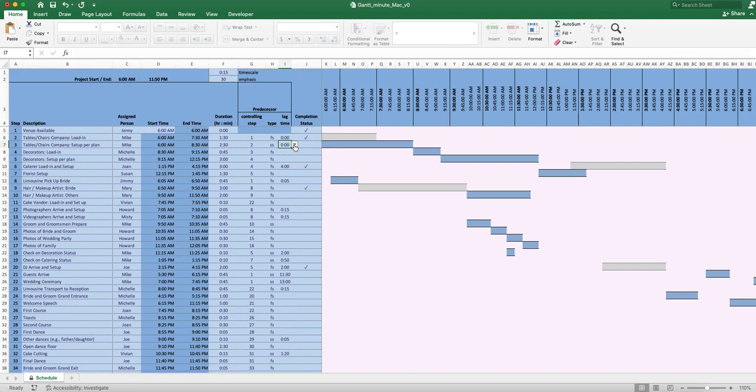The reason why I put say a 30-minute lag time in there, for example, is, say that it's going to take Mike about 30 minutes to get a few off of the truck. Then he's got to read the plan, drink his coffee, figure out where he is, look at this new venue, what does it look like, and try to figure out, okay, what's the plan say? Where are those tables supposed to go? Where are those chairs supposed to go? Oh, okay, I see now. All right. And then he can start, he doesn't have to completely pull all the tables and chairs off, but he needs about 30 minutes before he can start putting them where they go. That's where that 30-minute lag time comes in there.